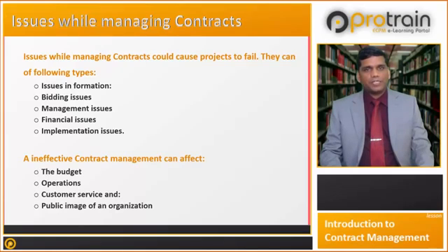Let us talk about management issues. Unclear and/or misunderstood roles and responsibilities, lack of experience in contract management, change in requirement, pricing errors or omissions, poor transition planning from bidding stage to post-award stage are very frequent contract management issues.